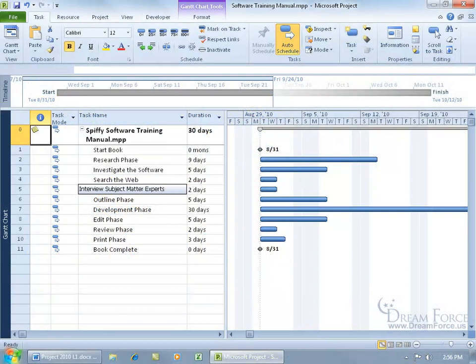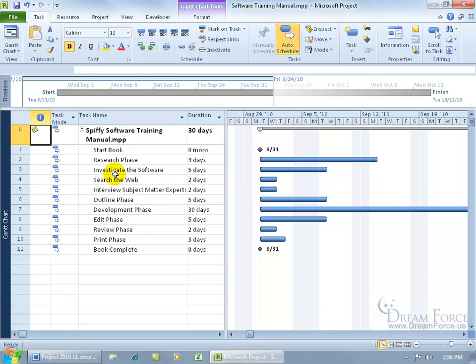Each task that I entered into the project, the basic tasks, not the summary tasks like the research phase, are going to require some sort of resource to complete the task. Resources, as I mentioned in my first training video, can include workers, materials, and costs.